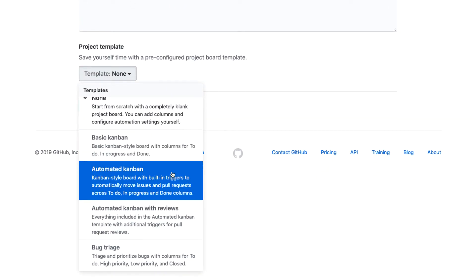So that's what this basic Kanban looks like. You can then also do an automated Kanban, which essentially is the same thing, but GitHub will automate things for you. So for example, when you create a PR, it might automatically move a referenced issue from to do to in progress or to done possibly when it's closed out.